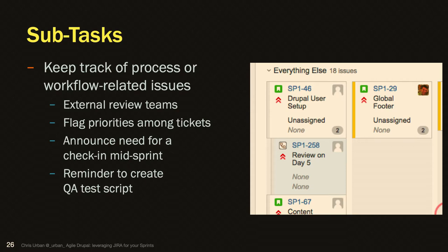Can I give you an example of where we're using subtasks? We have an epic called bio for the bio content type, and then if a task or a story was themed the bio content type, that's linked to the epic. But if all the work were done on that one ticket, the PR was too big. So then we're using subtasks to do the basic content type pages, a separate subtask for theme, the entity reference to their event. I just started introducing subtasks in that way, but now I'm worried.